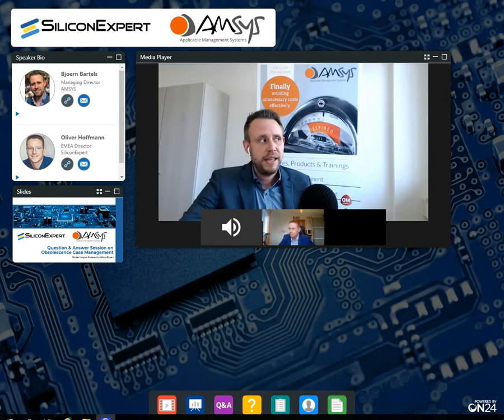And then proactive obsolescence management means that you have to combine the likelihood of each and every item in your system that you want to manage proactively with the possible impact of this item becoming obsolete or having way too long lead times, or what will be the impact on your overall system and your company, and so on.